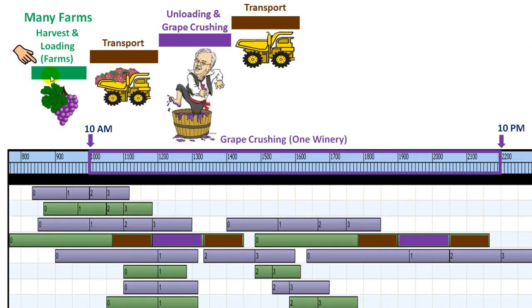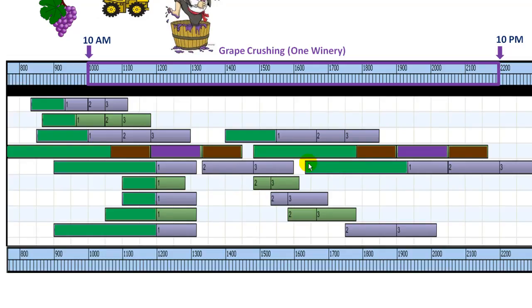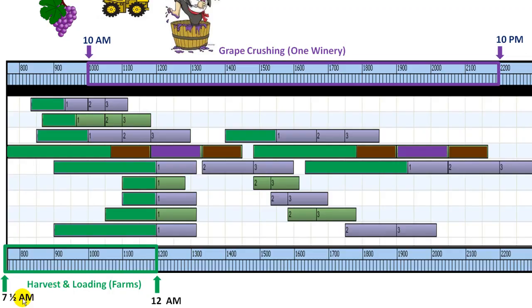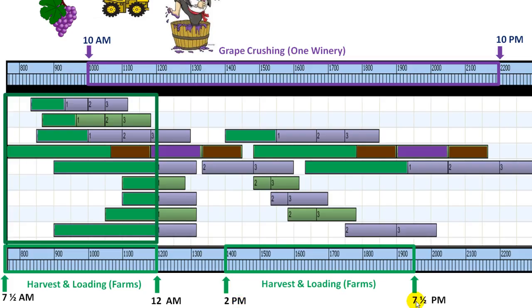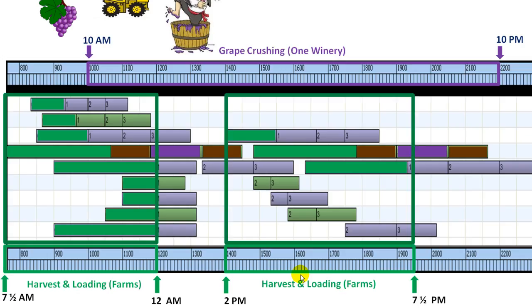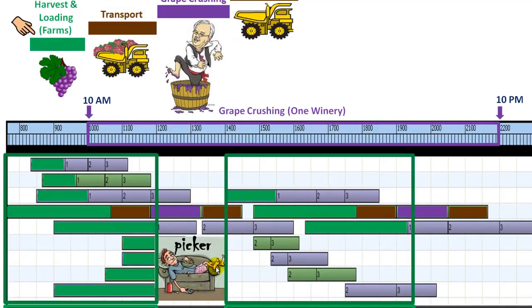Another hypothesis is that the duration of the harvest and loading activities depends on timing. All harvest and loading activities have to start at 7:30am, up to midday, then start up again at 2pm, ending at 7:30pm. In Argentina — specifically in San Juan and Mendoza — all these activities are scheduled within this temporal window because we have a long siesta between those hours.